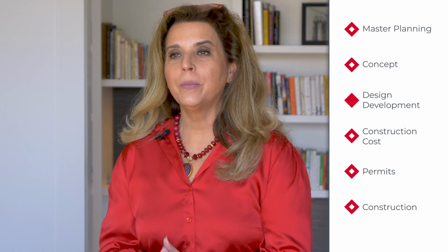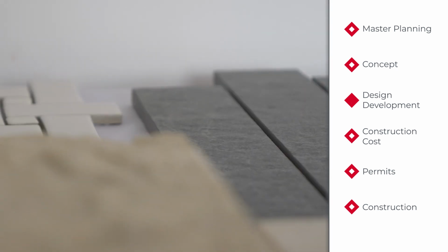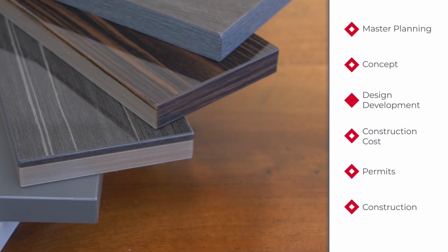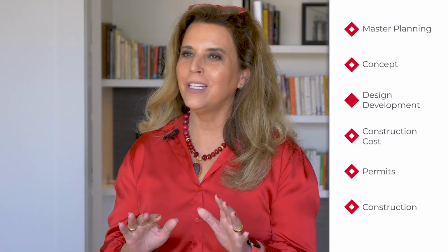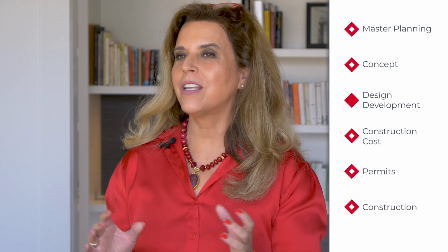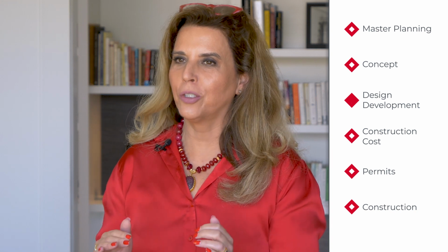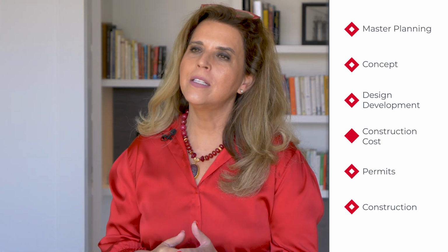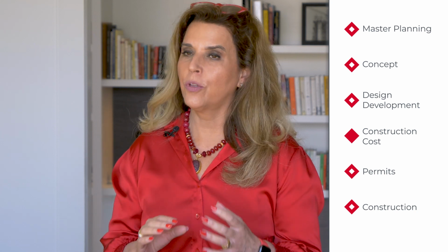model of your home. The purpose of the design development phase is to select all the materials that make up your home, from windows to roofing to siding, brick. I know it's a long list. At the end of the phase, we take all these selections that we collaborated on and we put them into this digital lookbook. The construction cost phase is about developing a fixed construction cost for the project.